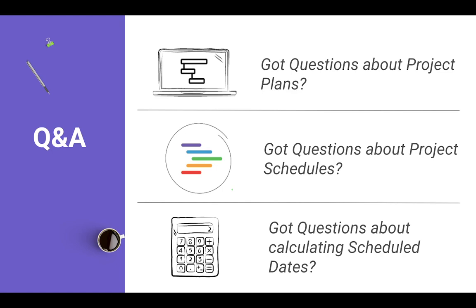You can have auto start turned on for fixed deadline schedules, and on fixed schedules, auto start is by default on and you cannot turn it off. So the schedule type isn't the only variable that plays into tasks automatically starting, and the most important setting to turn on is that auto start setting.